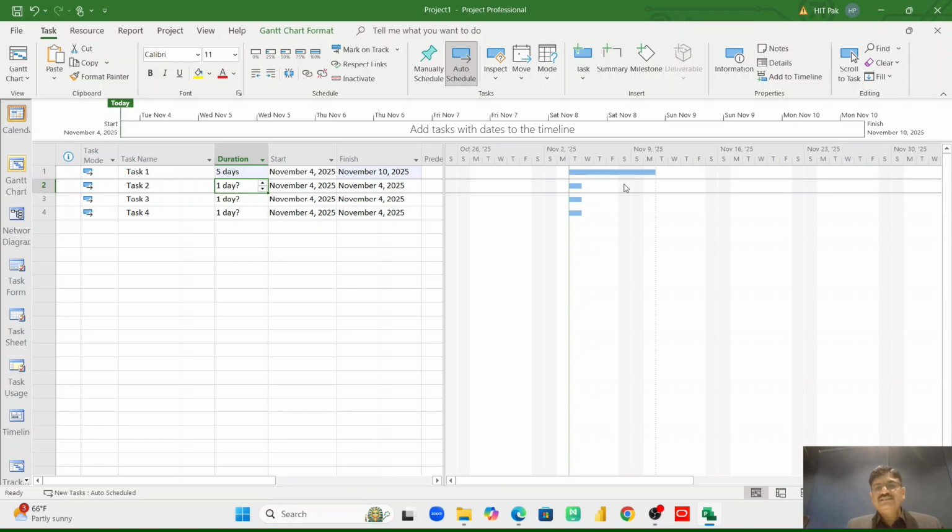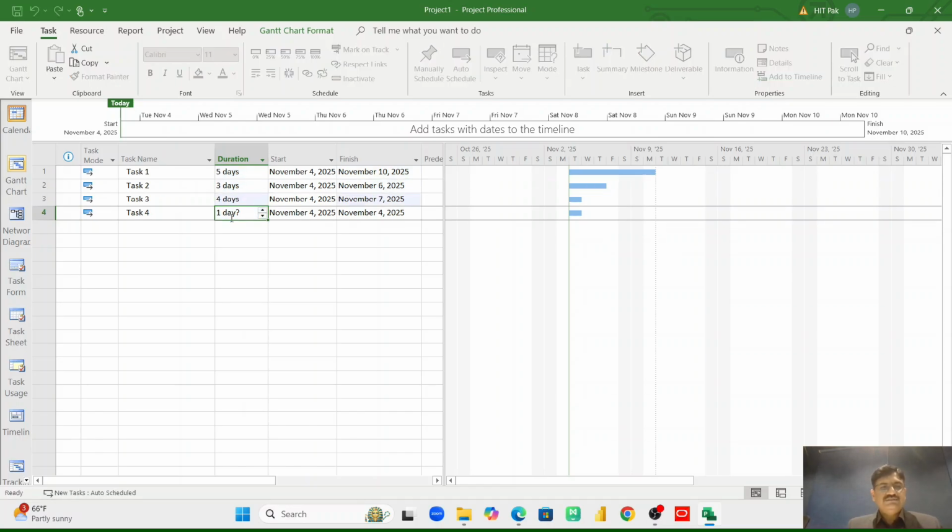It shows 5 days because Saturday and Sunday, the gray part of this chart, are the default off days in Microsoft Project. Once you count the other days, these are the 5. The other tasks are 3 days, then 4 days, then 2 days.